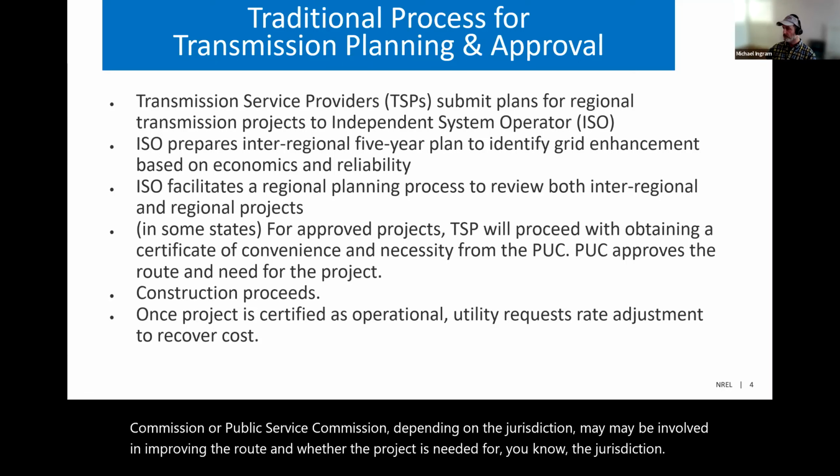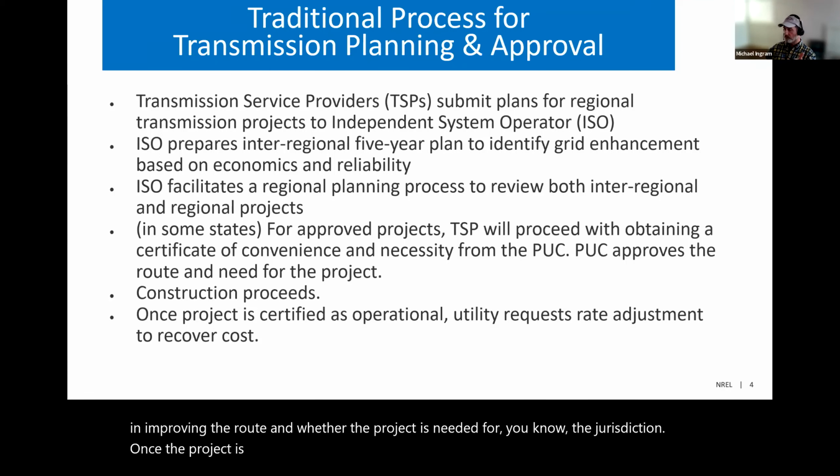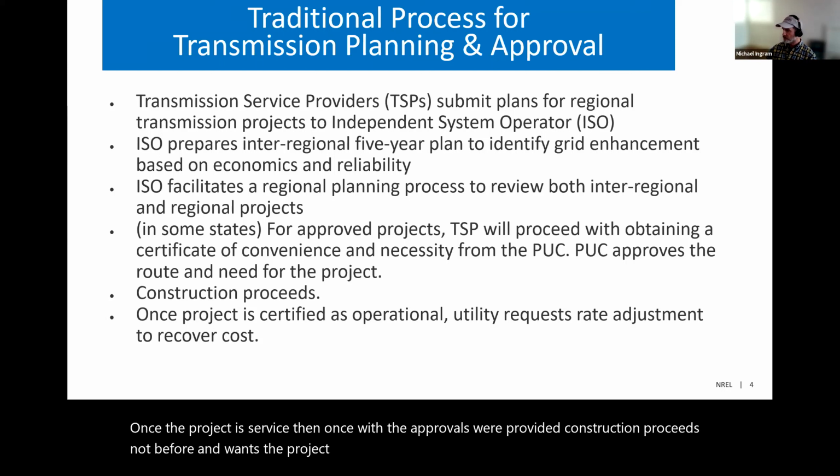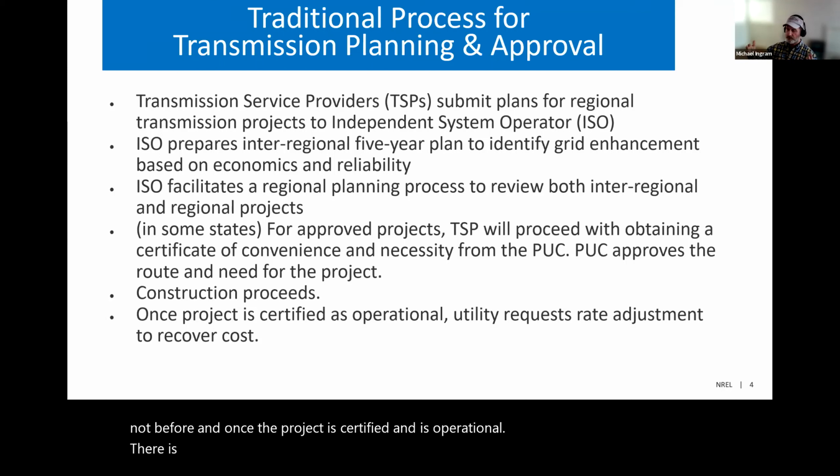Once the approvals are provided, construction proceeds, not before. And once the project is certified and is operational, there is a return to the PUC or the rate making authority to allow for an adjustment to the recovery.